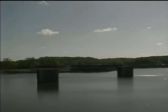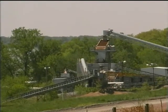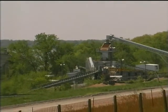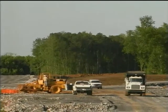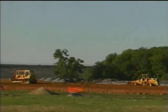Severely sloped terrain in the immediate vicinity of the lock limits available space for construction staging and laydown. Facilities are required for concrete production and formwork and reinforcing fabrication for both conventional and roller compacted concrete. Additional areas are required for long lead materials storage, steel fabrication, construction office trailers, and construction equipment maintenance and parking.